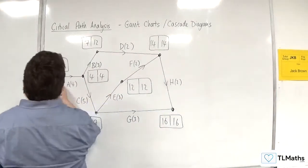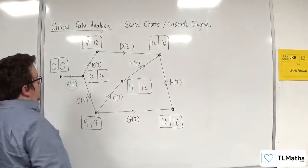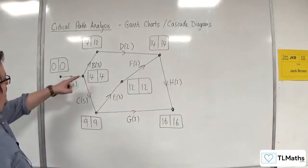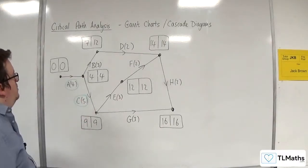Now because we've got 0, 0 and 4, 4, there's only one route out. That means that A is definitely critical. 4, 4, 9, 9 - 4 plus 5 is 9, so C is also critical.